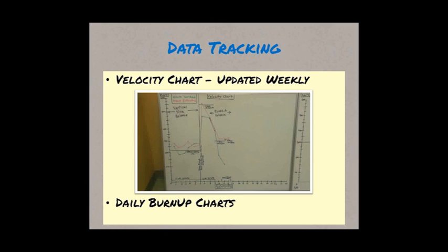And then that's also the first time we tried 2-week sprints, as we were getting a little tired of the long weekly meetings trying to plan out everything for Vertical Slice. And that also happened to be around the time we had a break. So that big jump in the charts is due to having 3 additional developers, making our team 15, doing a 2-week sprint, so we're planning twice the amount of tasks for everybody. And then you see it kind of dip towards summer break there at the bottom.